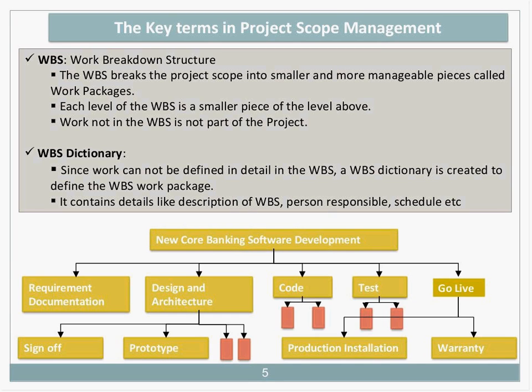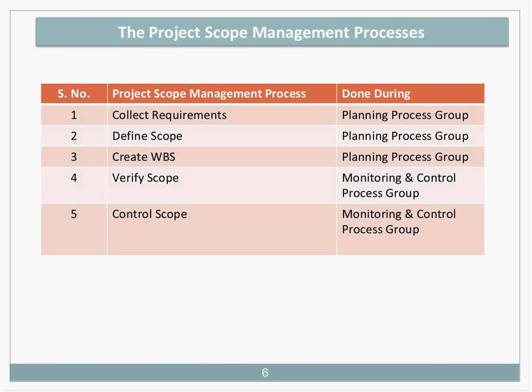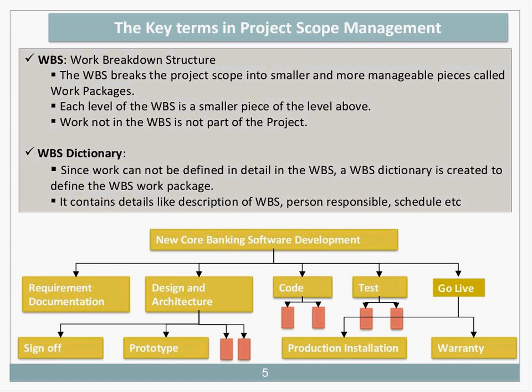Where this WBS and the WBS dictionary fit in with the rest of the project: the WBS comes down at the bottom to the work package level, and for each and every one you would find the WBS dictionary. From the WBS dictionary you would do estimating. If you look at what we said is in there, the cost baseline, our project schedule, quality planning, procurement planning, our resource requirements, all those things are part and parcel of the information that we get out of our WBS dictionary.